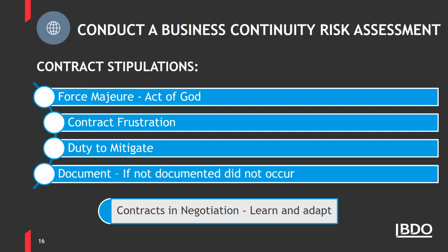As Kyle mentioned, record every action, notice, identified risk to the projects, and meetings where COVID-19 and schedules were discussed. Documenting all this will be critical in proving your losses, whether you're seeking relief from government, relief from an insurance perspective, or potentially through litigation. In general, consider segregating or specifically identifying COVID-19 related charges, delays, and impacts in a daily impact recording note, and clearly state it's due to COVID-19.